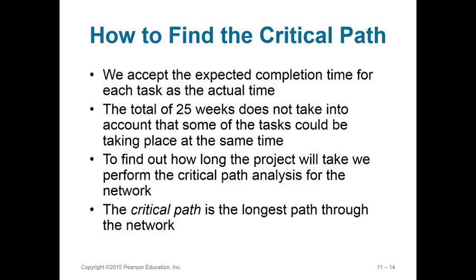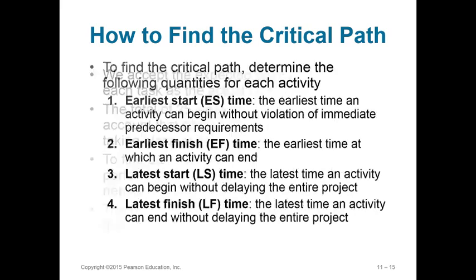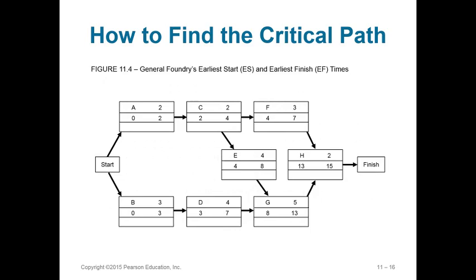So which of these is there essentially no slack in? And we'll actually calculate slack here in just a little bit. So you take a look at the earliest time to start, the earliest finish time, latest start, latest finish time for each activity so that you can see if there is some level of slack out there, where might that slack be. And now you have begun the early start and earliest finish times for each activity.